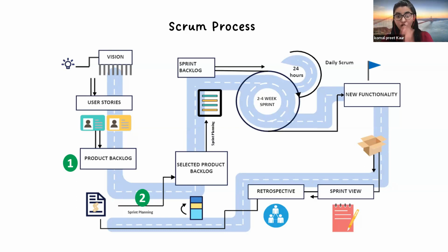But when it comes to the on-ground work, that is the development team, they can explain or make us aware, like the product owner aware, okay, this is possible because these are the technologies that we can use and it can be done. So in sprint planning, what set of tasks we define, we also give priorities to them, like it can be priority one, priority two, and what will be the time taken for this. Okay, all that's done by sprint planning.